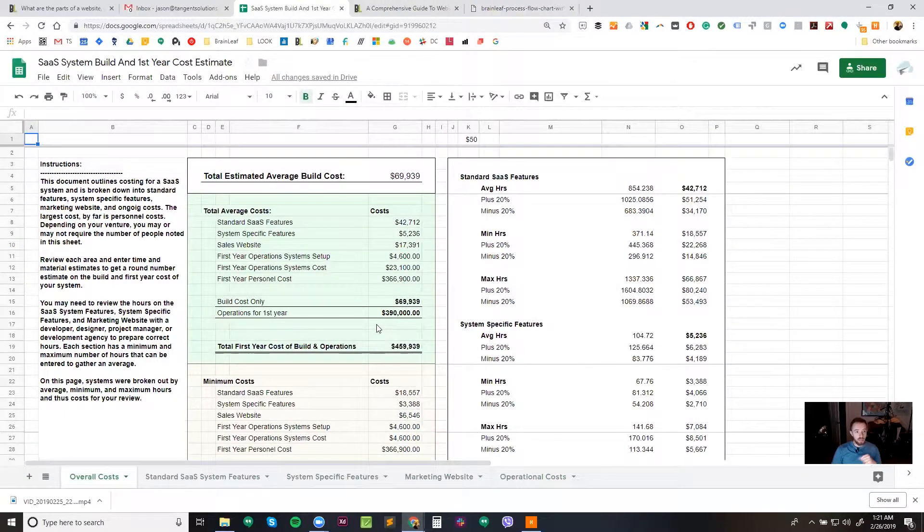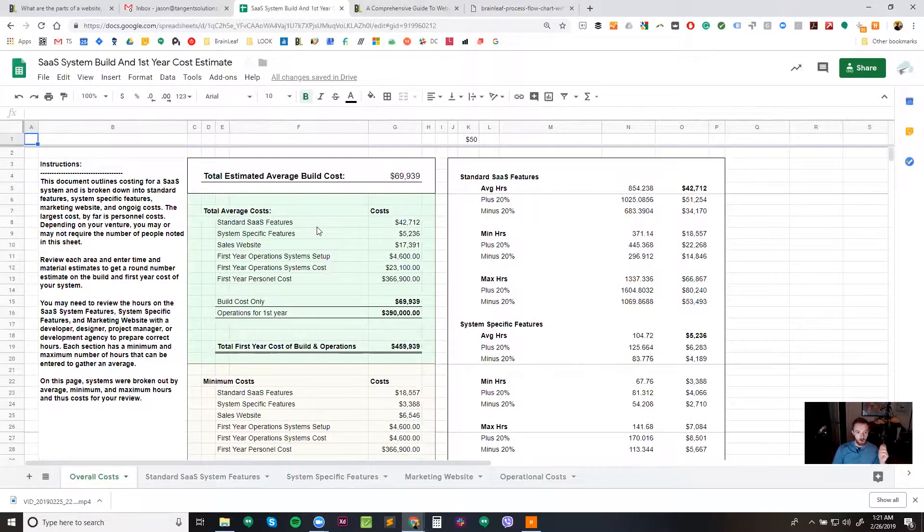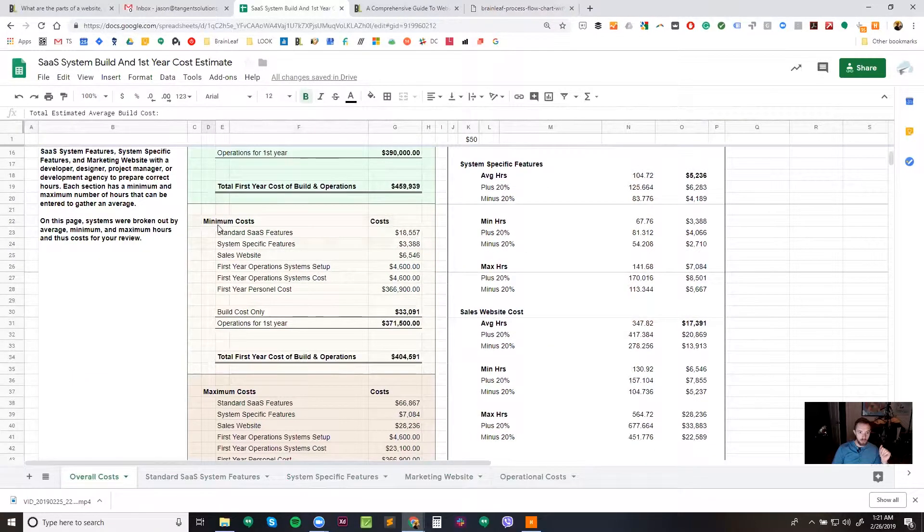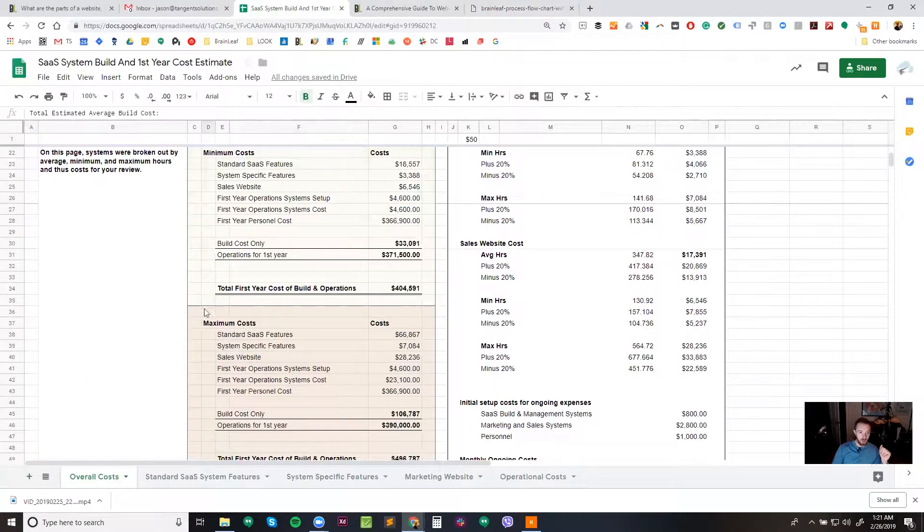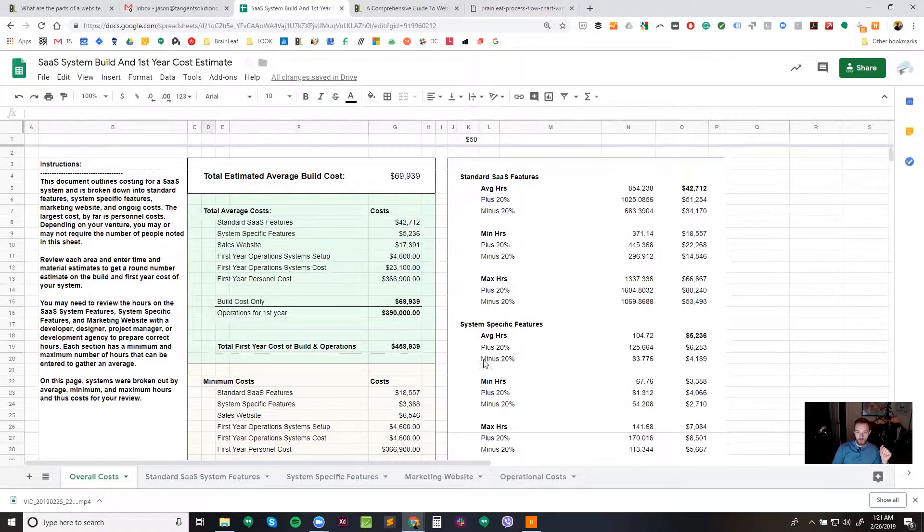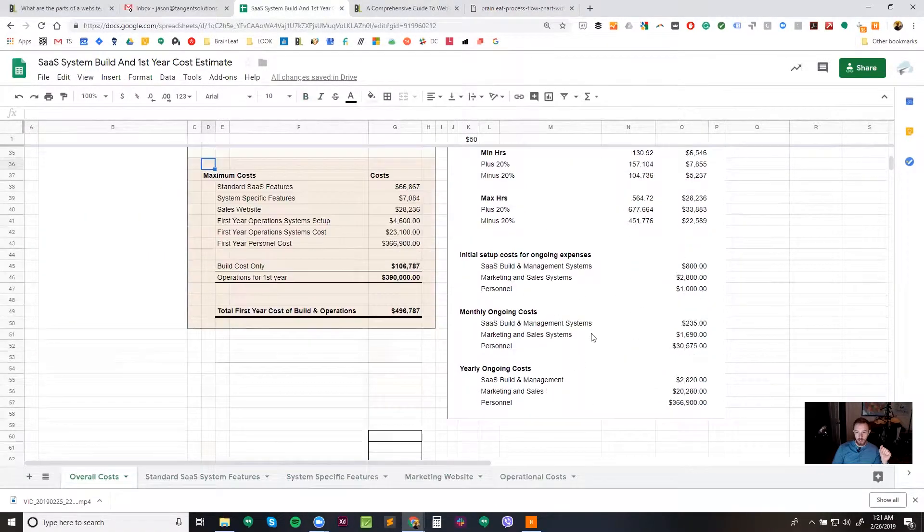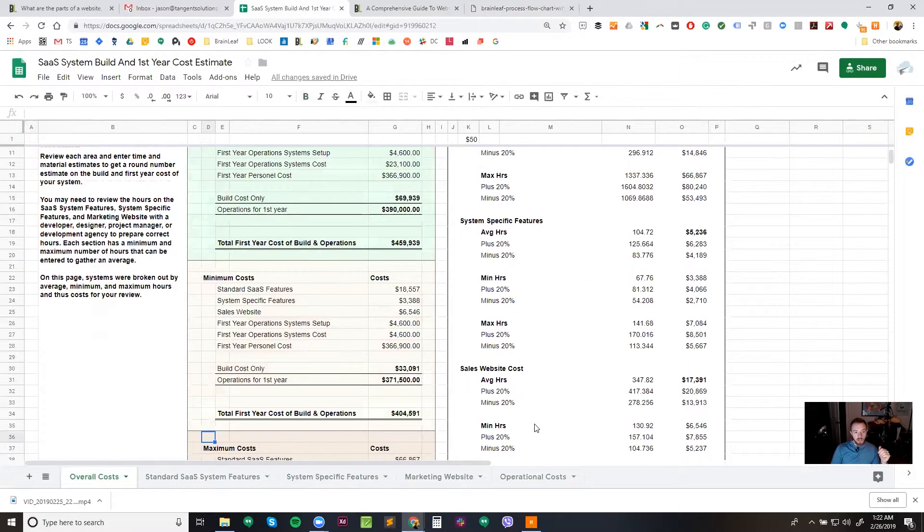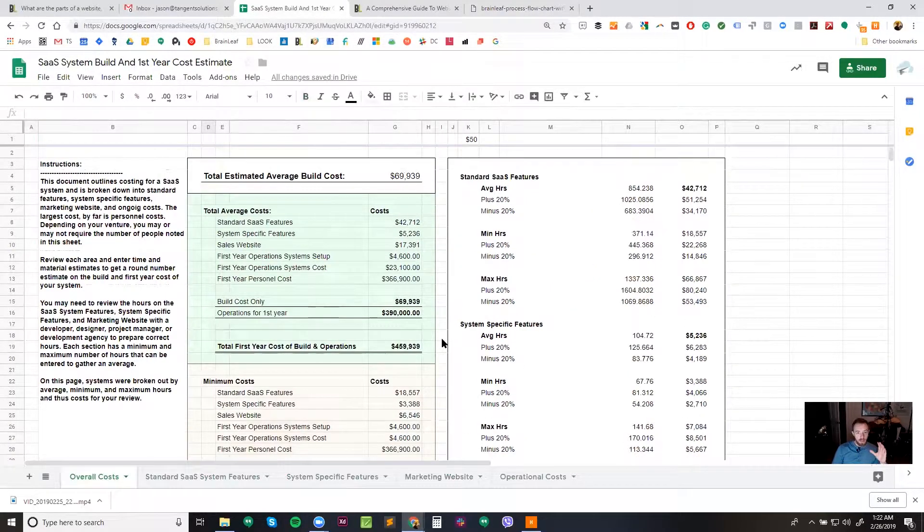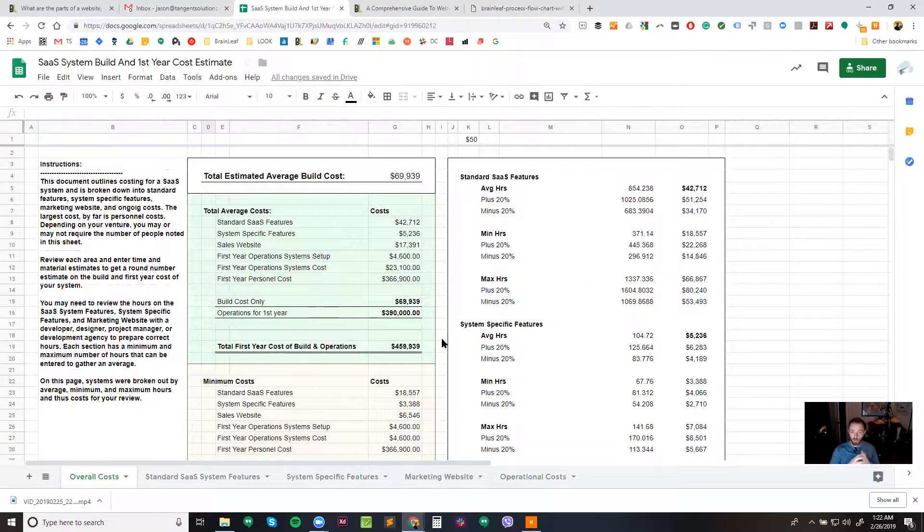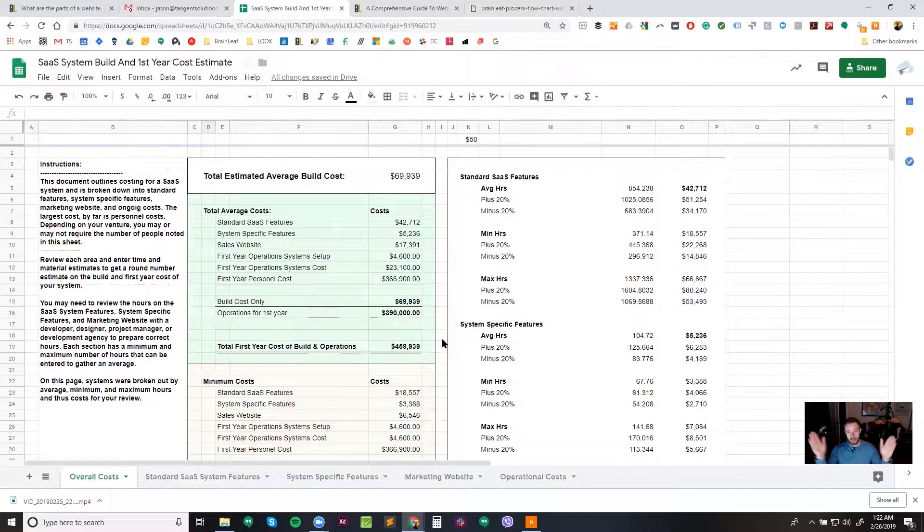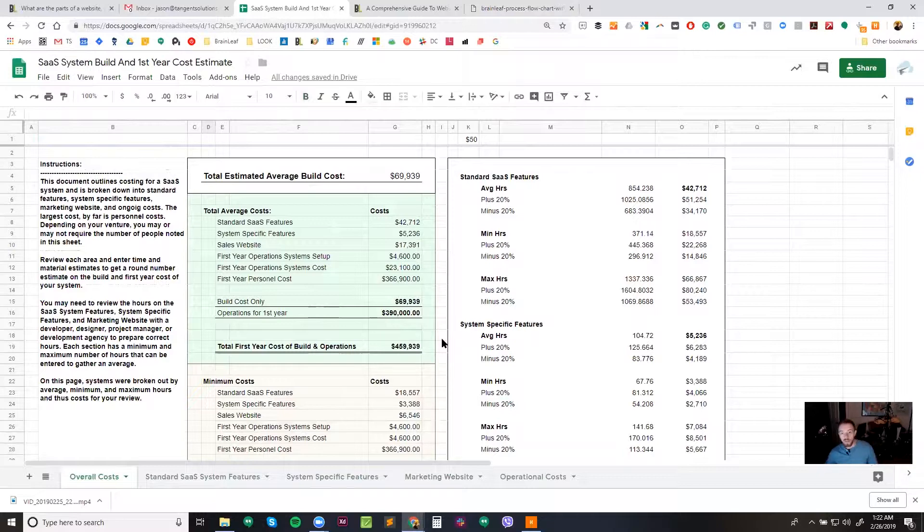And all of this comes together in our overall costs area. So here we can see just our total average cost. We can see our minimum costs, our maximum costs. And then you can also see your plus minus 20% on each area here, initial monthly and yearly. So like I said, what we do is we start off with just this bigger range with less questions answered. And then we go through and we go through each line with that customer and we bring that range down. And if that range looks good to the client, then, and only then, do we start working after we have a contract or an engagement in place on the information architecture.